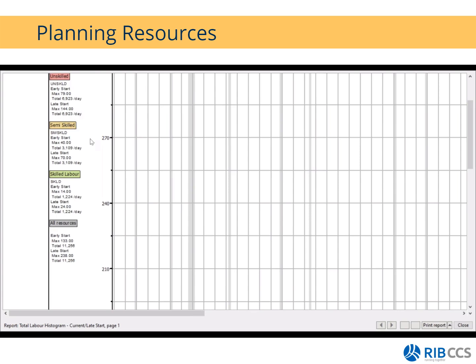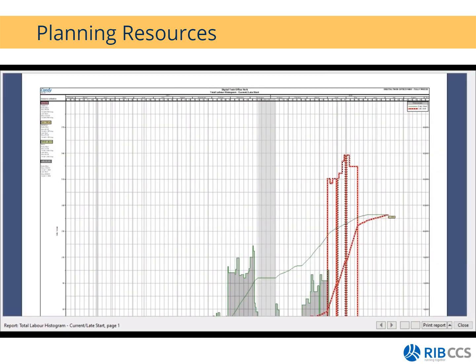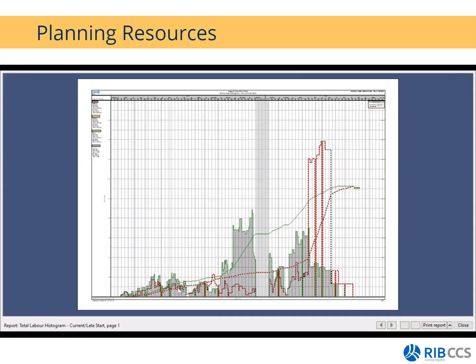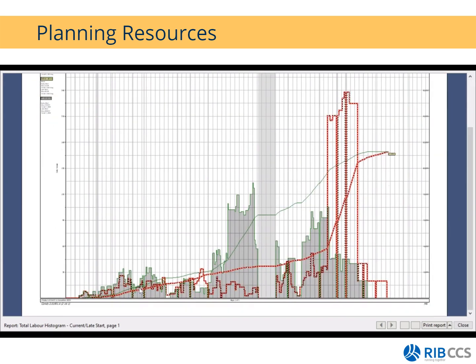So you can obviously select any resource that you would like to monitor and print out this report. If I zoom in a bit, you'll see that these are my daily values, and I have my S-curve running with the early start as well as with the late start.